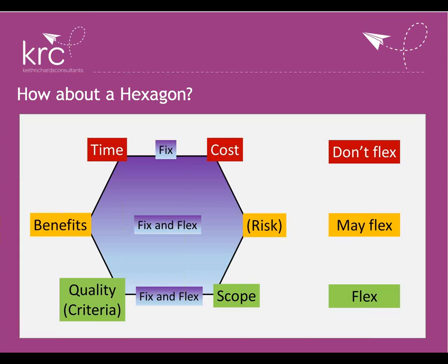We're not talking about the quality level, we're talking about quality criteria. An example I often use is something must work at 0 degrees, should work at -10 degrees, could work at -20 degrees. This is quality criteria. So as long as we deliver the feature that hits that requirement, then we're okay.